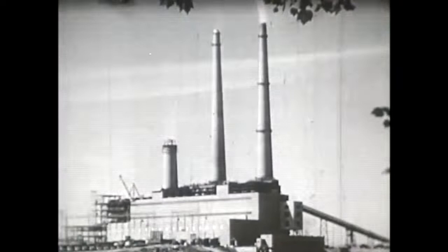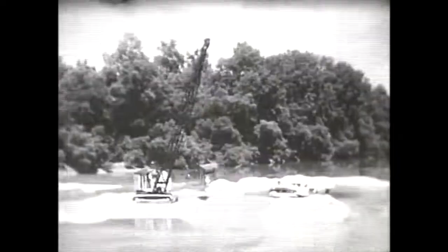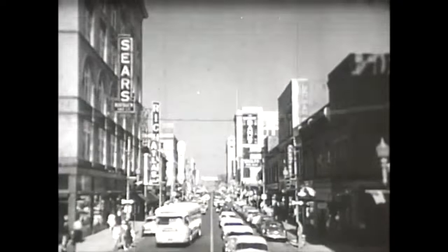This vast construction job was authorized by the Atomic Energy Commission as part of an expansion program to increase production of fissionable materials. Also included in the program were additions to the Oak Ridge and Paducah plants at a cost of $500 million each. Factors most important in selection of the site were availability of economic electric energy, availability of water for both power generating facilities and plant operation, adequate potential labor, and suitable transportation facilities.